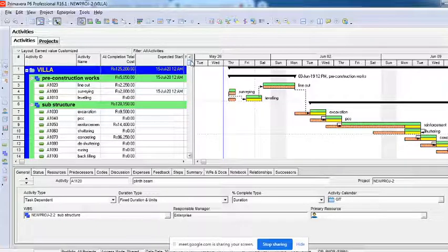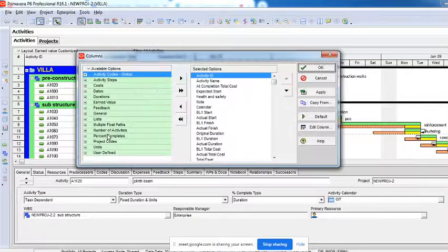I call it a client's cost. The cost you are seeing right now is the expenses of a company. There are no profits in this, right? Expenses plus the amount of profit becomes your client's cost or the final expected cost of the project. Alright, so now I have created it as a final expected cost, right? I'll bring it down here.